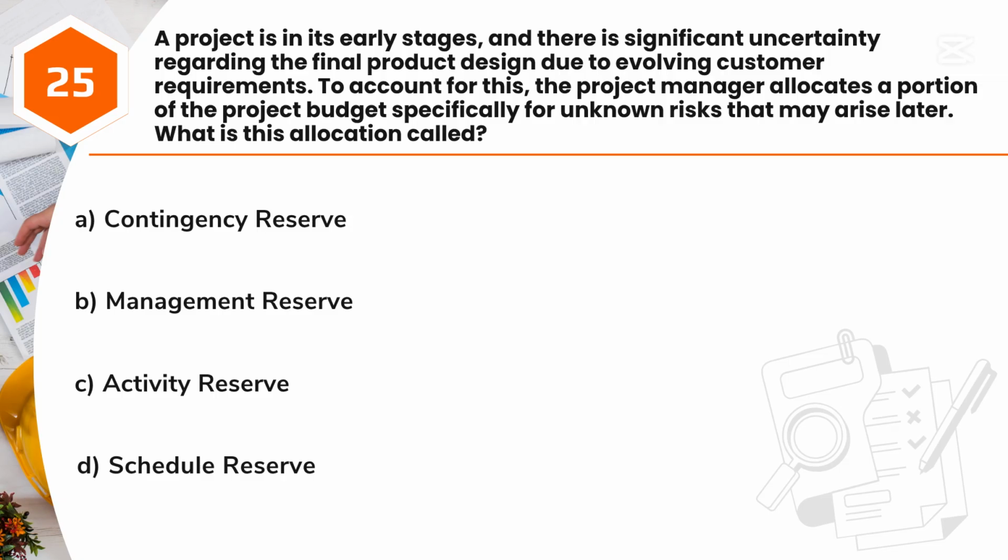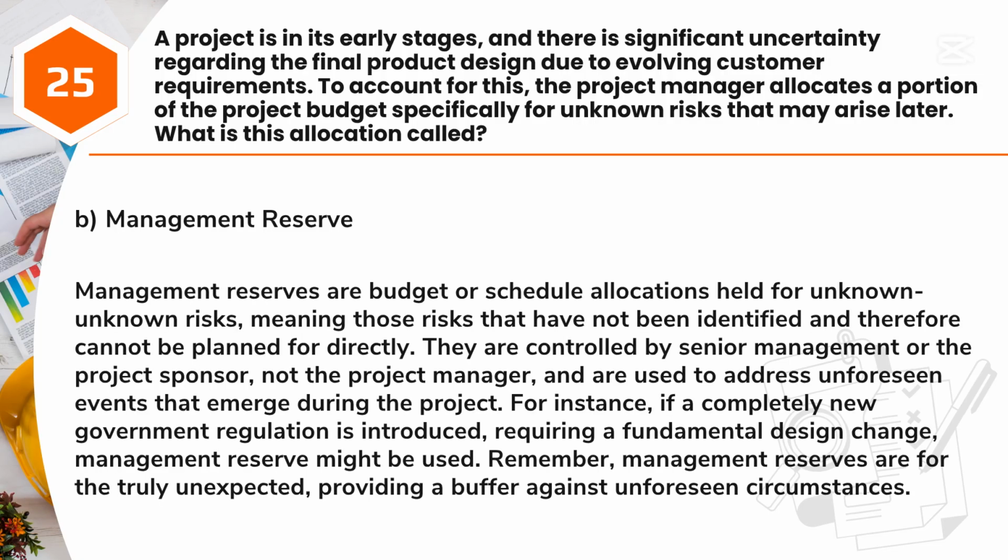Answer: B. Management reserve. Management reserves are budget or schedule allocations held for unknown risks, meaning those risks that have not been identified and therefore cannot be planned for directly. They are controlled by senior management or the project sponsor, not the project manager, and are used to address unforeseen events that emerge during the project. For instance, if a completely new government regulation is introduced, requiring a fundamental design change, management reserve might be used. Remember, management reserves are for the truly unexpected, providing a buffer against unforeseen circumstances.